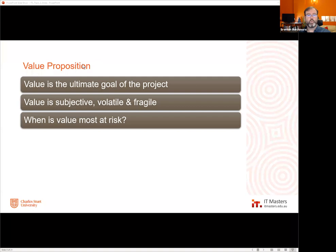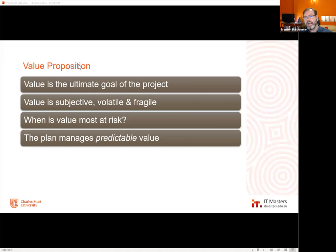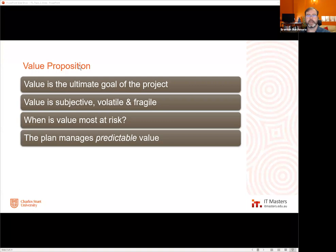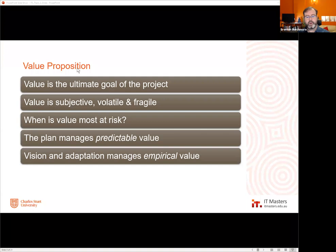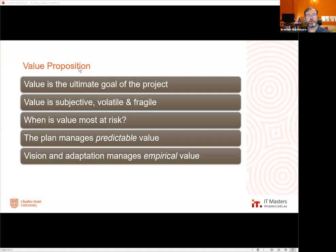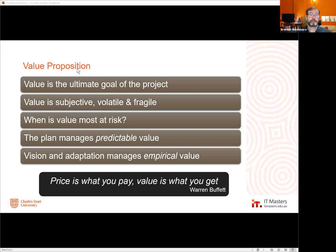When's the most risk? When we don't know what it's meant to be yet, or when we don't know whether it can be achieved yet. So what a plan does — a planning-based project — it manages the value that we can predict. And that's all it can manage. If you can't predict the value, you can't plan for it. But having a vision that's loosely defined and continues to get refined stage by stage, iteration by iteration, and adapting what you're doing to that end vision as it evolves — that manages the empirical value, the value you're discovering along the way. It lets you adapt where you're applying your resources so that you're increasingly delivering something closer to what's actually needed. Warren Buffett, the very successful investor, says: price is what you pay, value is what you get. It's the result.